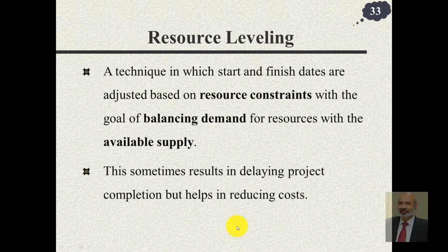And this sometimes results in delaying project completion, but it helps in reducing costs. Remember, in the previous case, our objective was to reduce time. We didn't care about cost, but we wanted to have the least incremental cost. Now we are doing the opposite. We want to reduce cost even if it is at the expense of increasing the project completion time.